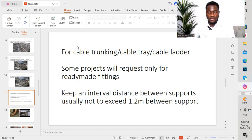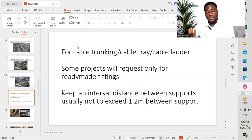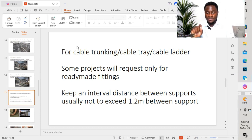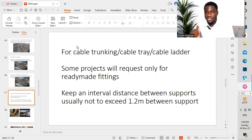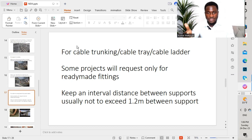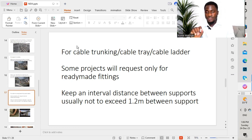For cable trunkings, tray, or ladders: some projects will request only readymade fittings. It is very important to understand this — if the project specifies only readymade fittings, you have to ensure that you follow the project specification. When installation is done on site, you check the installation of trunkings, tray, or cable ladders and ensure that all fittings are readymade — no fabrication on site.